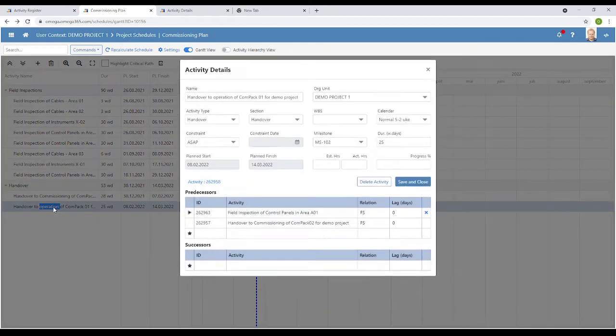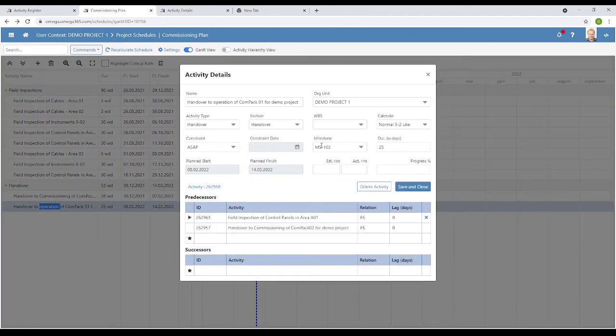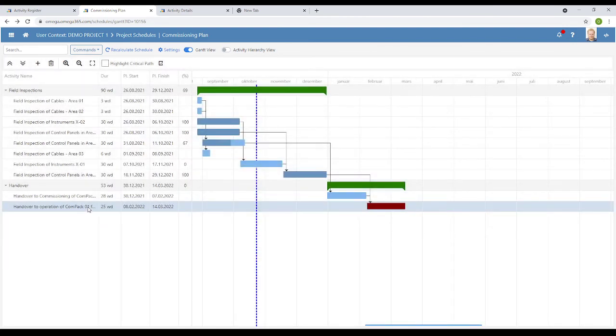So you can tie an activity to a milestone, and this milestone register can also be access controlled, so that someone else can update the data. You might agree with the project that this can be delayed, and then someone will update the milestone register, but it's not automatically updated based on the activities here by design.